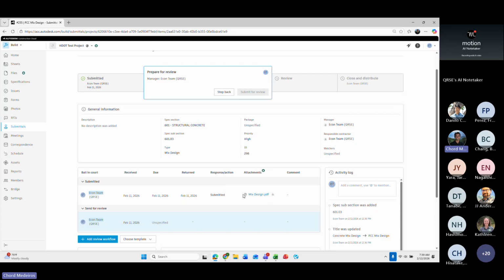You guys probably already know that, but I just wanted to reiterate that one of the most important things that, if I don't see it on a submittal, I submit back or return back to them immediately, is what they're intending on using this mix design for. So the pay items are obviously something to look for. And without the pay items, your project team needs to go in and look for what they could potentially use it on, but that's not the best way to go about it.